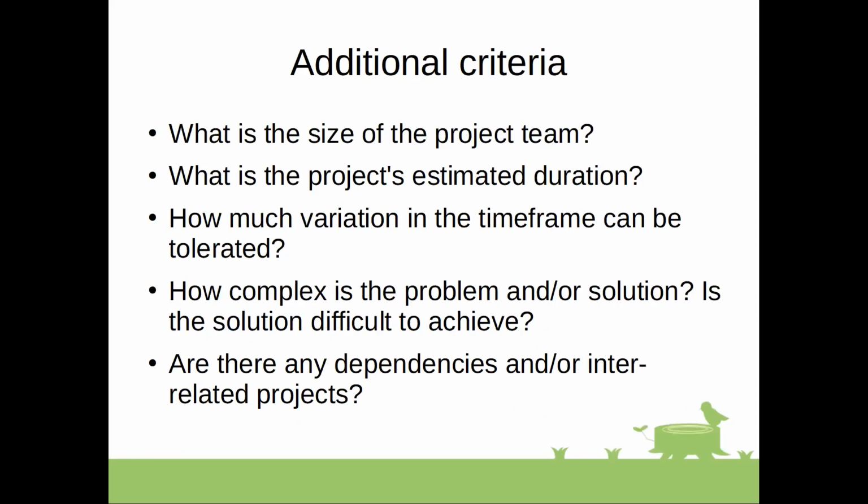What are the additional criteria for project sizing? You need to understand how big of a project team you need for this project. That basically impacts resources, it impacts the budget, it impacts stakeholder management and communication management plans.